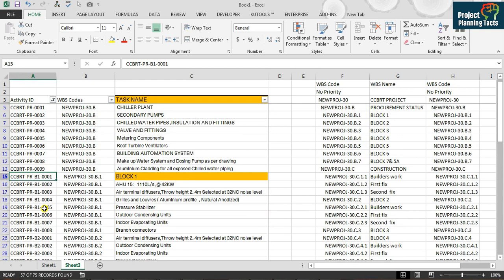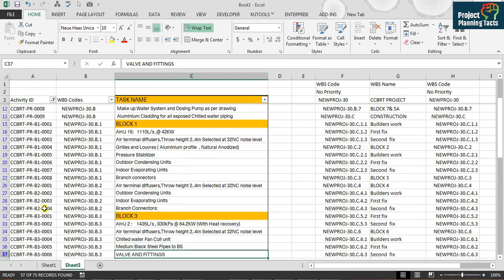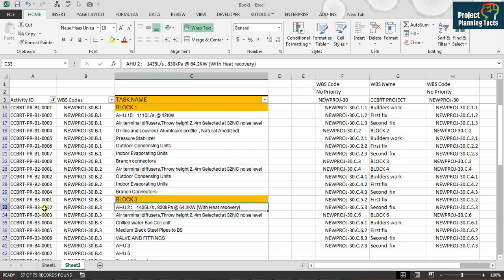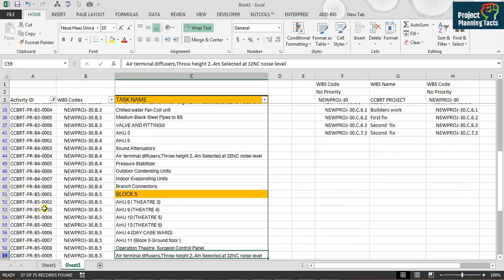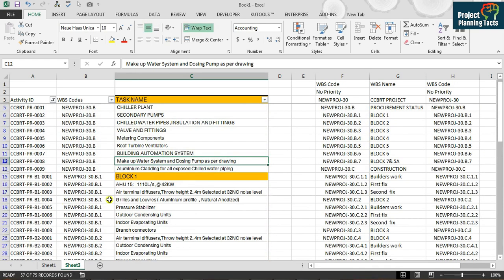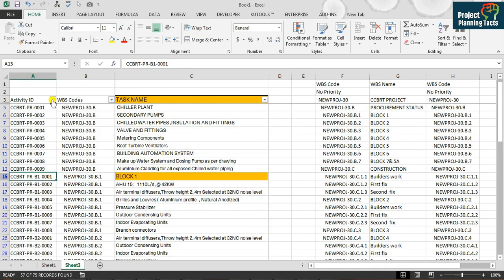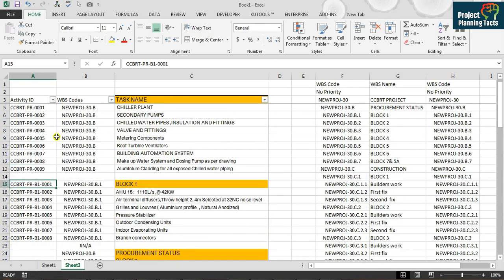And here, if you see, I have assigned by mistake at the WBS level, which I am going to change, and this is also I am going to change. When you highlight cells, it will find out that you mistakenly assigned the activity onto the WBS level. So I will review, select all, Control X, Control V, and the last activity I will remove.